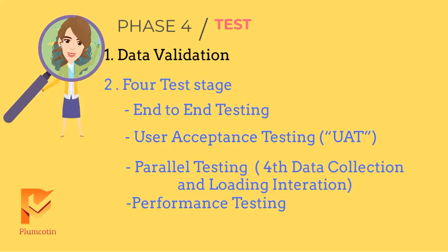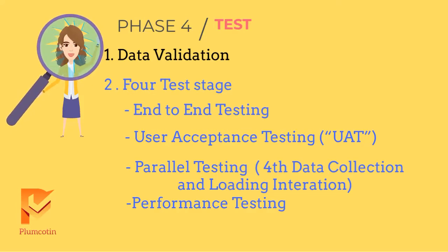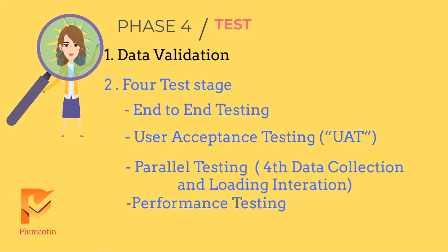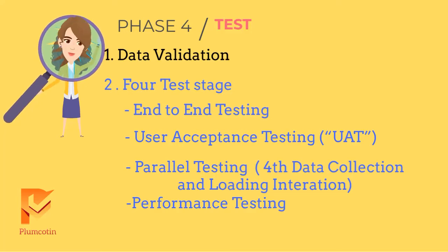User Acceptance Test, UAT. A series of testing scenarios conducted by selected users to confirm the operation of the Workday service. A UAT condition list helps verify all criteria are tested. Formal sign-off is required.